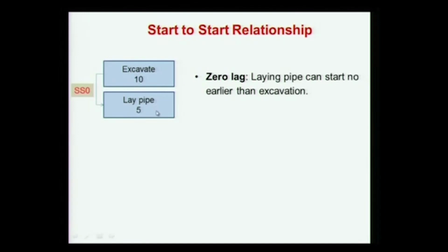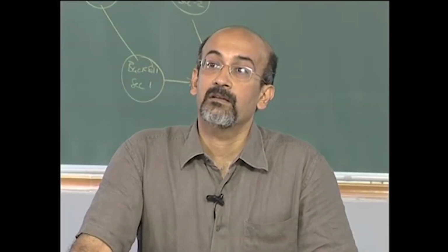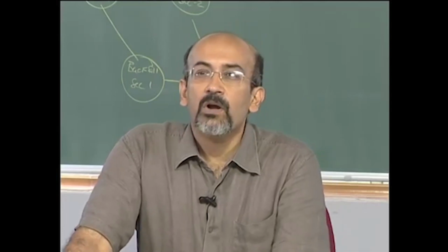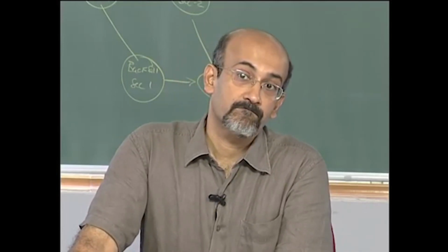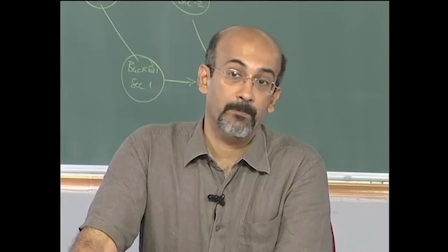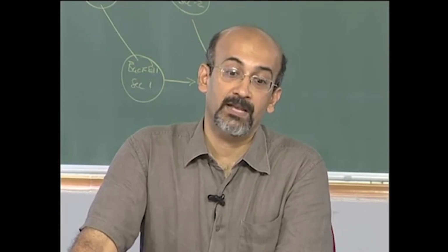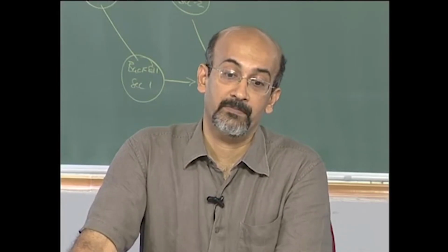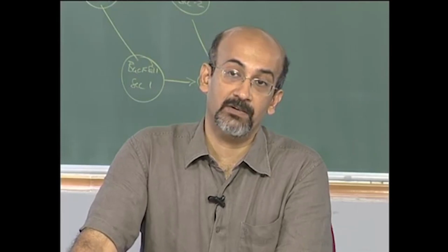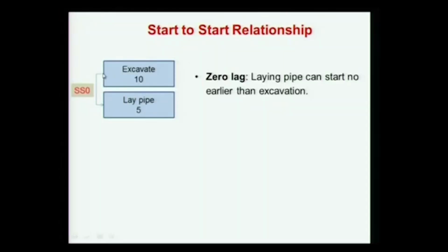But is this acceptable? This almost says I can start immediately with excavation. No, it says that you cannot start unless the excavation has started. Here is excavation, starting of excavation. Laying pipe also. So right now, the constraint is that laying pipe should not start before excavation, that's all.